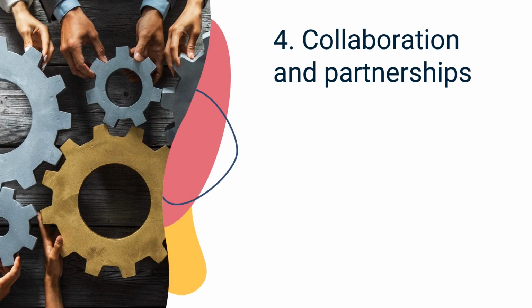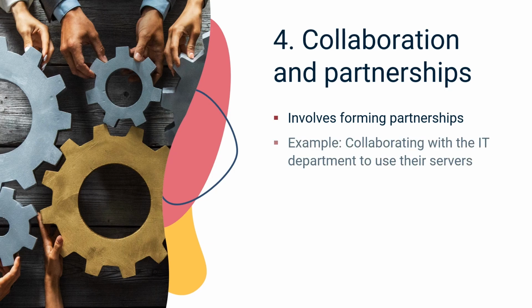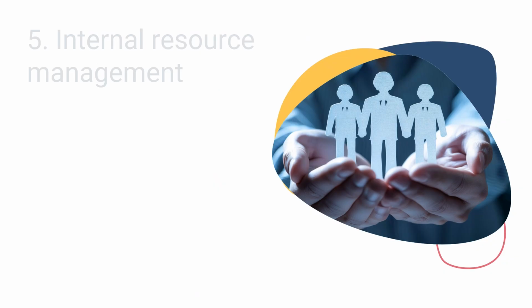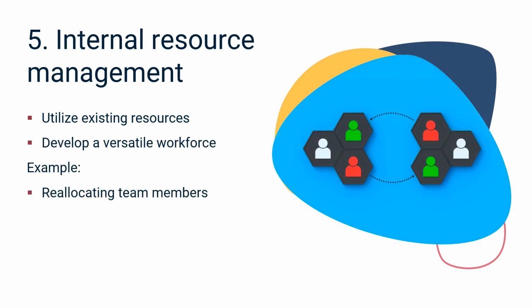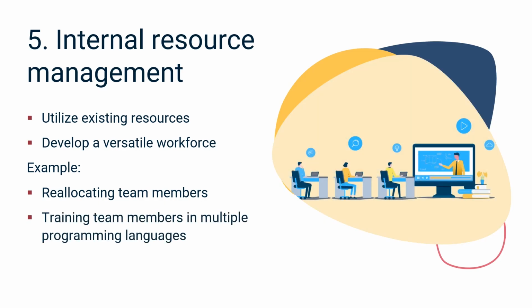Next, collaboration and partnerships involve forming partnerships across the organization to share resources. For instance, collaborating with the IT department to use their servers for testing purposes. Then, internal resource management includes utilizing existing resources within the organization and developing a versatile workforce capable of performing multiple roles. For example, reallocating team members from less critical projects to urgent ones or training team members in multiple programming